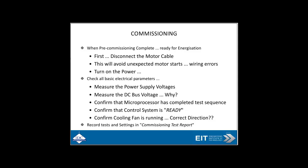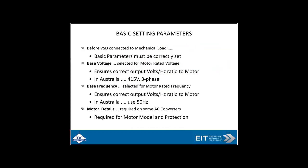When ready for energization, just connect the motor cables so you don't have unexpected motor starts — which can be a bit embarrassing. Check all electrical parameters: voltages, DC bus voltage, and confirm the microprocessor is ready. Make sure the cooling fan is running in the right direction, and test the motor to confirm it is running in the right direction as well — we all know what happens when you run a pump in the wrong direction.